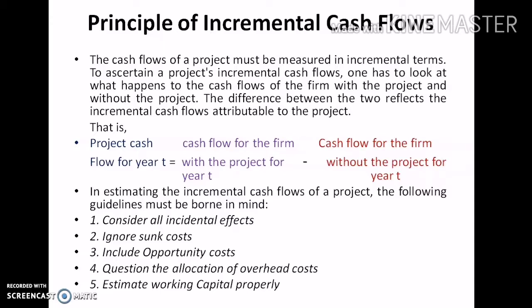Therefore, the incremental principle mainly highlights that the project cash flow for a year T is equal to the cash flow for the firm with the project for the year T minus without the project for the year T. Therefore, in incremental cash flow, we get the difference between the with cash flow and the without cash flow of the project.